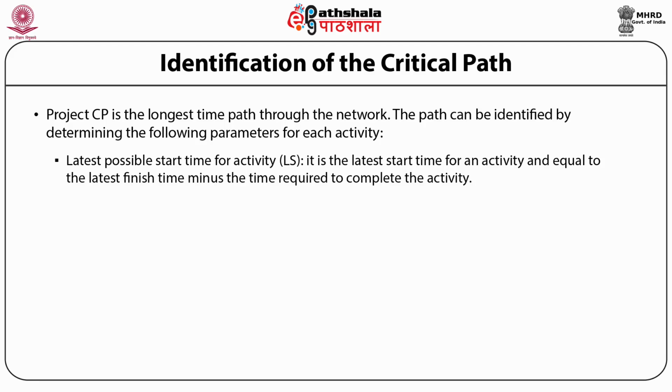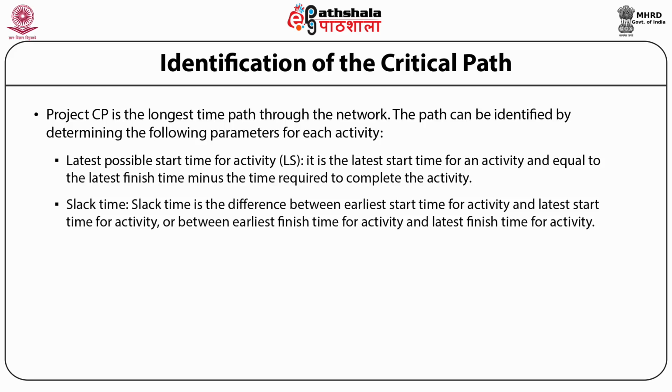It is the latest start time for an activity and is equal to the latest finish time minus the time required to complete the activity. Slack time. Slack time is the difference between earliest start time for activity and latest start time for activity, or between earliest finish time for activity and latest finish time for activity.